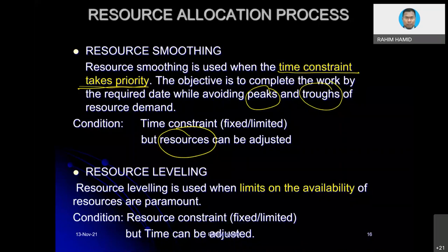Maybe if you cannot complete all the activity due to the limitation of resources within 1 month, perhaps you are going to adjust a little bit and maybe encroach into the following month by a few days. But then the upcoming activity, of course, you need to adjust as well. Otherwise, you are going to encroach the project contract period. We are not going to touch the contract period. We are just going to adjust the activity within the contract period.